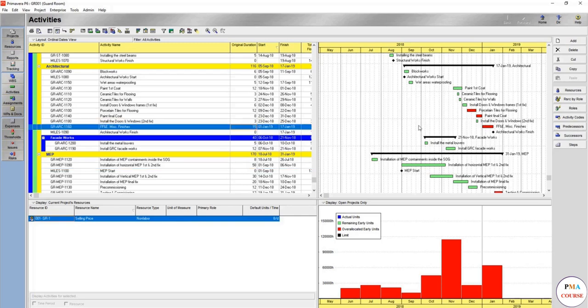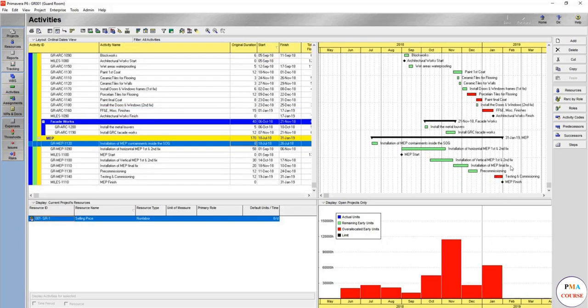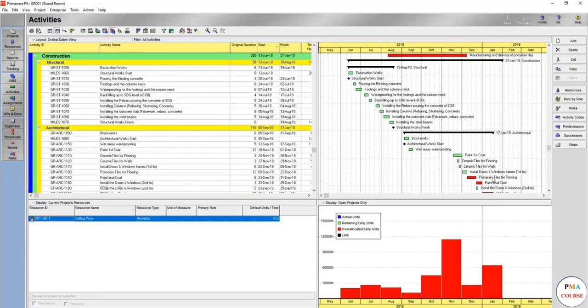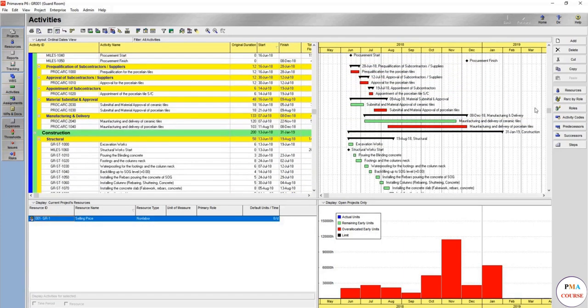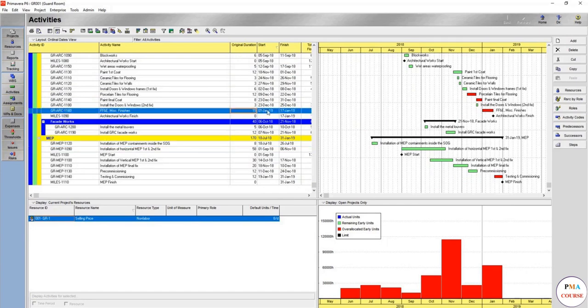So look for activities that weigh a lot and will increase September. And do the same for January. January, what do we have in Jan? We have IFE, and we have nothing more than IFE in testing and commissioning. So we might start IFE later on, because it started earlier, not later on.